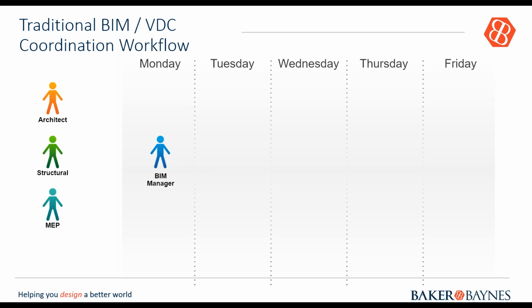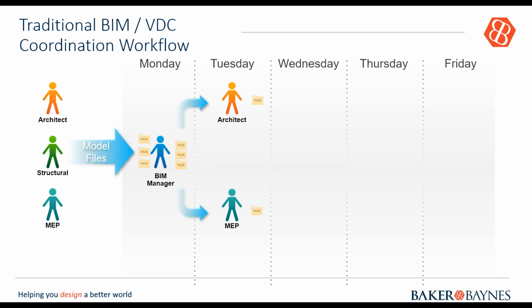So we have all these project teams. They have their files. They then send these files for Navisworks into the BIM manager. All right. The BIM manager then sets up and sends files. So he does his little clash detection, coordination management at his office, and then sends those files with the comments to each of the consultants. Okay. So Tuesday it's a bit different. Wednesday it's a bit different. Architect may come back and say, okay, I've responded. Here's my new file with my updated changes.